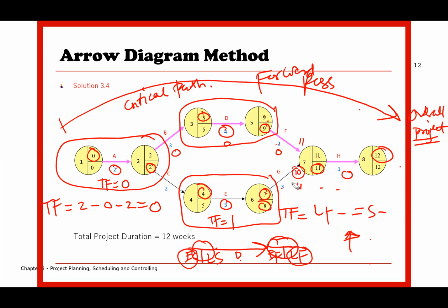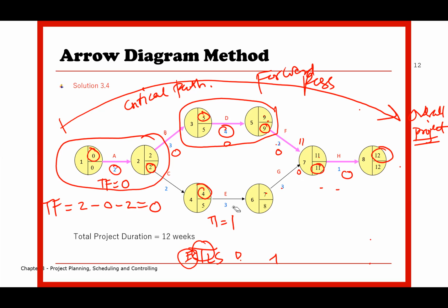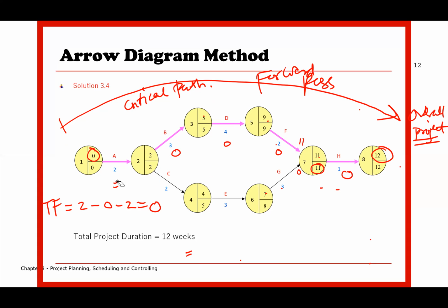How about calculating the free float? Since we do have this diagram, why don't we use this diagram to indicate the free float? First things first, total float is defined as the days an activity has with regard to the path and with regard to the overall project duration. Whereas the free float is with regard to the following activity only. And normally, free float will exist at this junction where 2 or many arrows enter into one particular node. For instance, if we draw a bar chart,